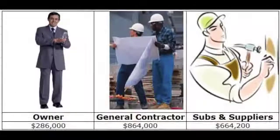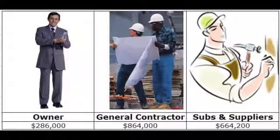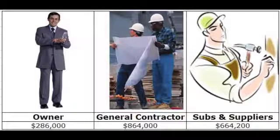For month five, the GC has earned $864,000 after retainage held by the owner. The subs have also earned $664,200, with the GC holding 10% retainage.